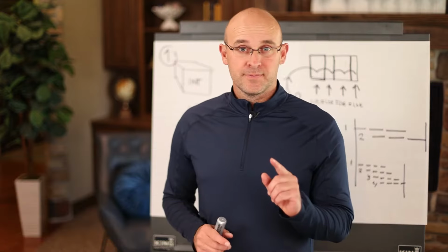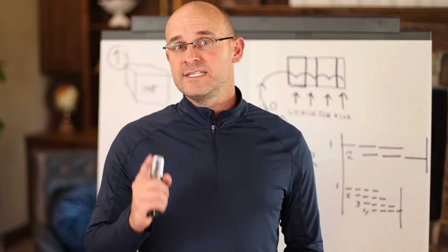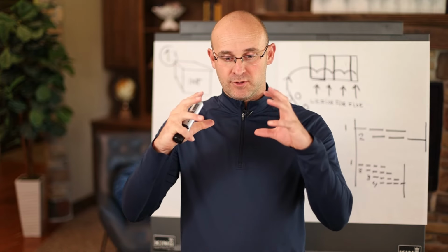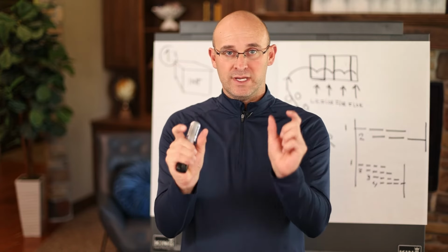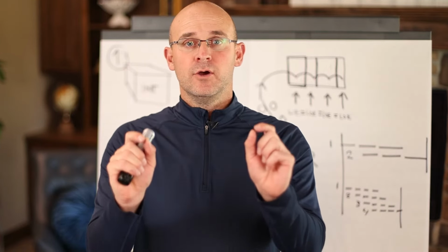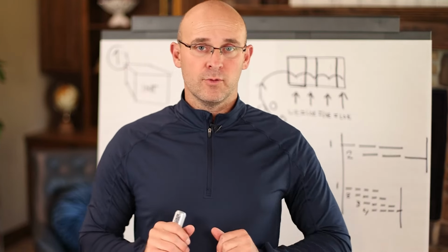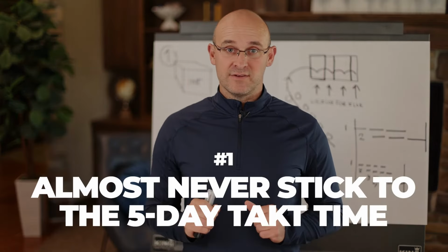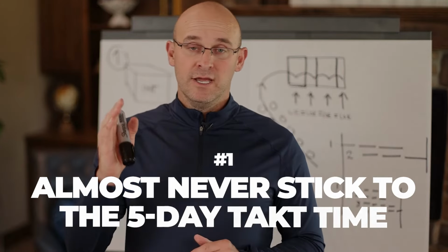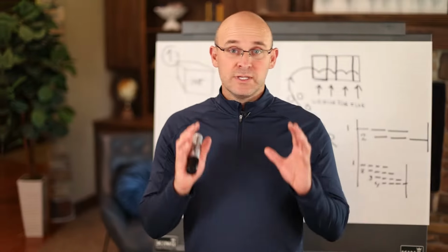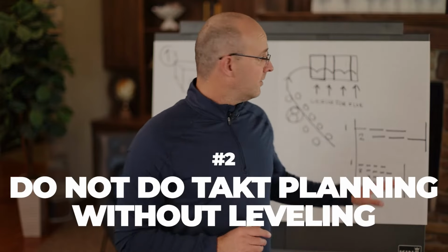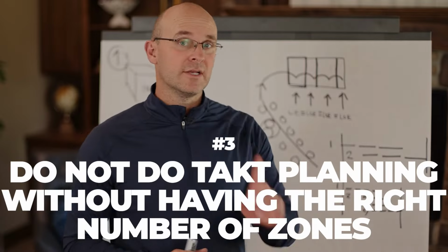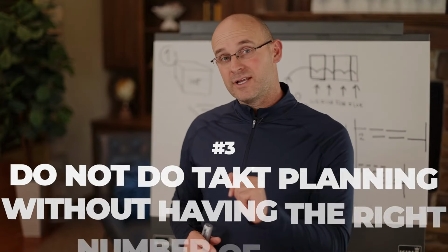But do not do the following. If you only stick with a 5-day takt time and you move your takt times or your activities and lock them between the weekends, the takt production system will fail for you, meaning it will not work properly. I can explain it later, but you will almost never stick with a 5-day takt time. It will almost always be a 4, 3, 2, or a 1. Please do not do takt without leveling like I've shown you. Also, please do not do takt without having the right number of zones according to the calculator, which you can find on leantakt.com.